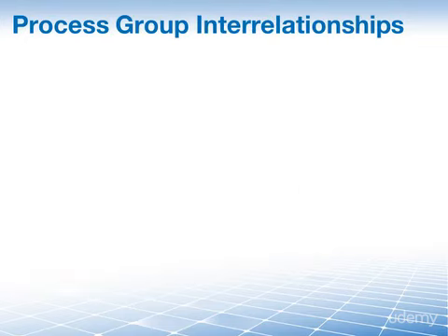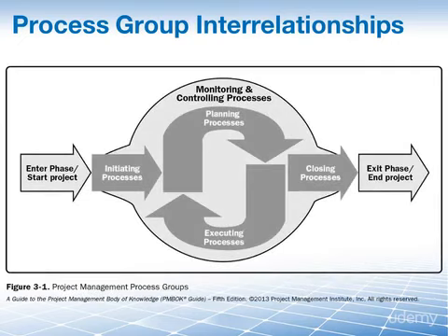The application of the project management processes is iterative, and many processes are repeated during the project, as you can see here with the start of a phase and the end of a phase going from left to right, and our process groups are in the center. You'll see initiating, planning, executing, and closing, sort of the dark gray in the foreground, and sort of lighter gray in the background, the monitoring and controlling process group.